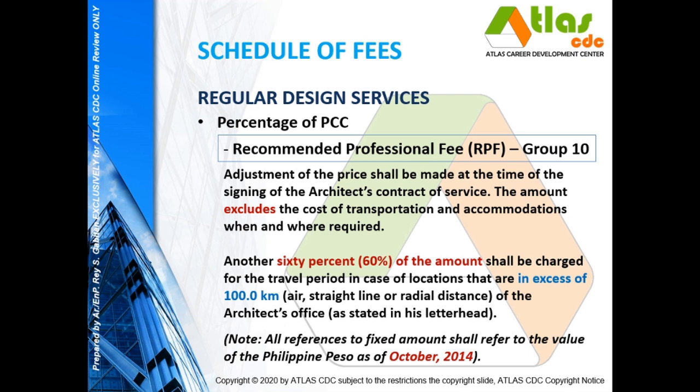So which means that the amount of the peso in 2015 is 5% higher. So just add 5%. Then 2016, again add 5% from the 2015 value, and so on, no? Until you reach the computation for the 2020 value of the 1,000 and 5,000.